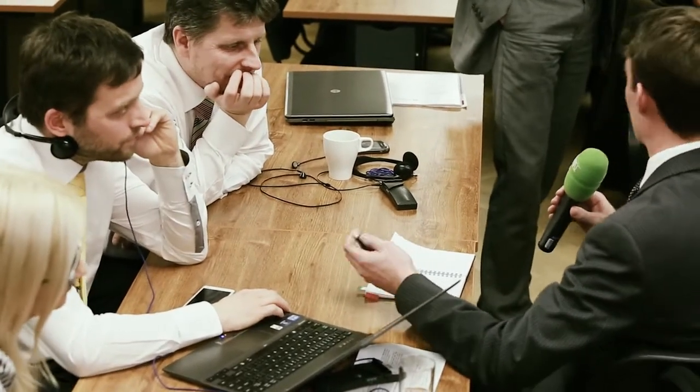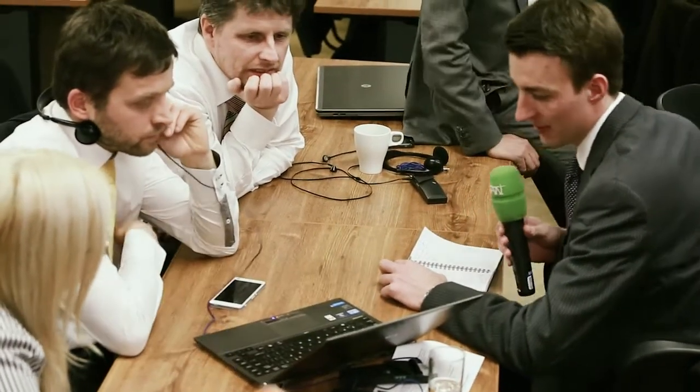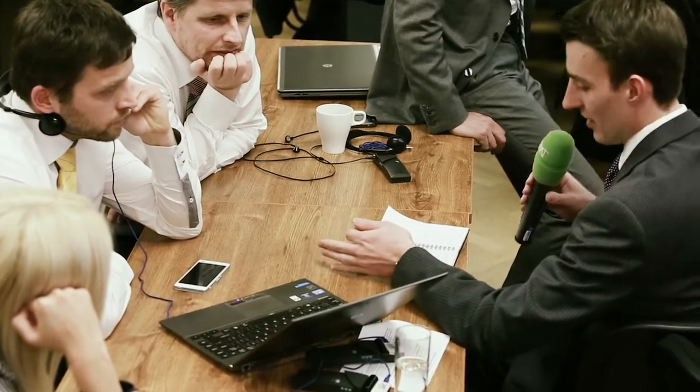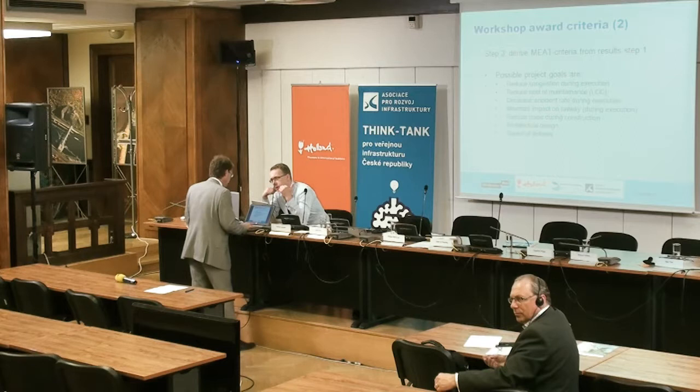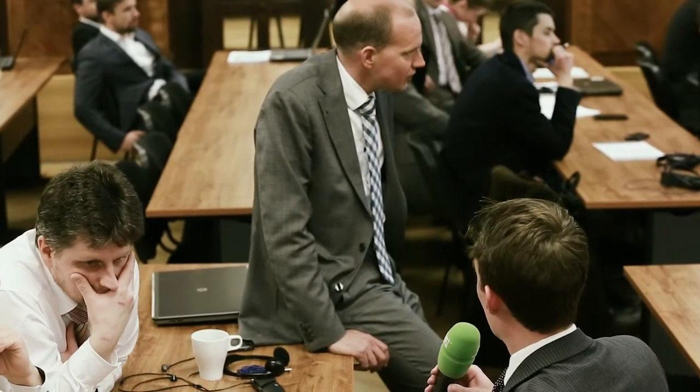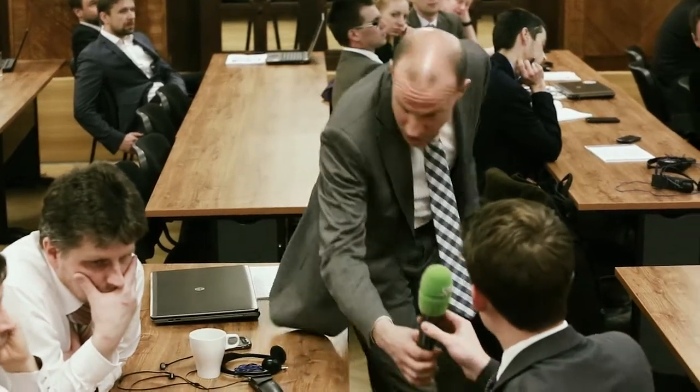We came up with several criteria which could be used in our view. The first one was basically the time that it takes until the commissioning and until the use of the roads. So we would be requiring a number of weeks from the handover of the site until the project is handed over to us. So that was the first criterion. So it would be a number of weeks it would take the contractor, who would assume the permits, right? Yeah. So does everyone understand this?